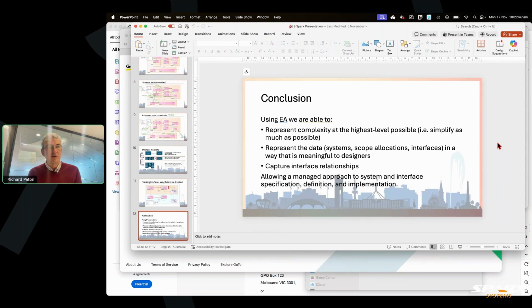The problem is that they were using Visio for the drawings, they were using Excel for the tables, and they were using Word for the words. Yep. And they were struggling to get the Visio drawings to match the Excel to match the words. And as soon as they managed to get things matched up, which took a long time, they would then bundle the document up and send it out.